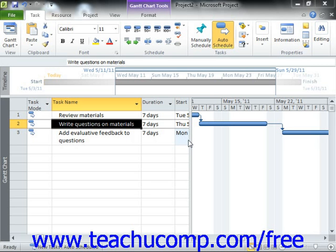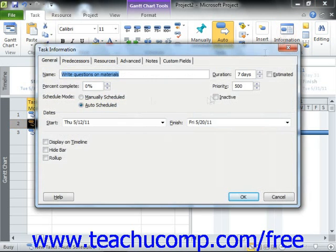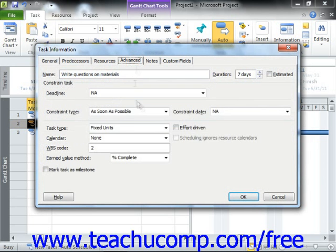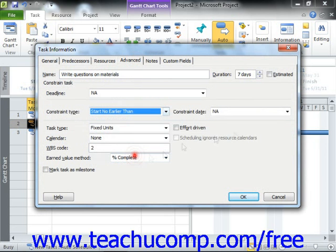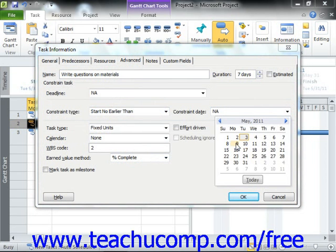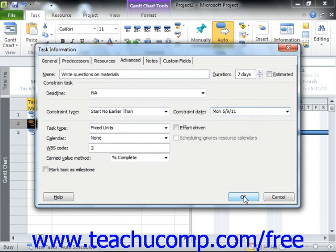In Microsoft Project, you can set the task constraints within the Task Information dialog box, on the Advanced tab, by simply using the Constraint Type drop-down. You can also use the Constraint Date drop-down if needed. When you're finished, simply click the OK button to save the task.